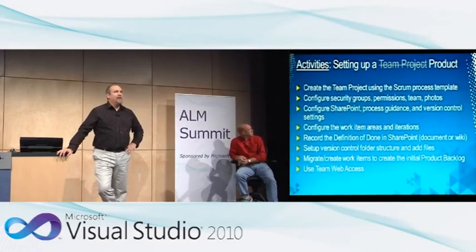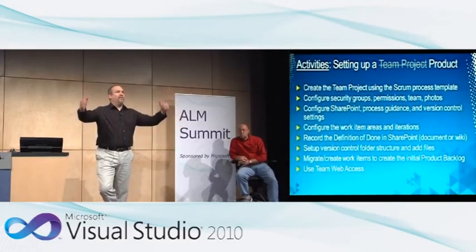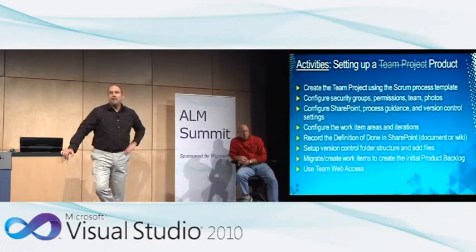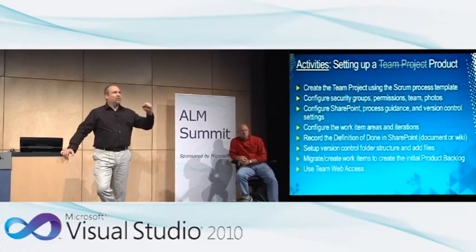We did an exercise in our Monday pre-conference where here's a big list of stuff. Some of it may be bugs. Some of it may not be relevant anymore. Some of it's things like we ought to back up our SQL Server every night. Awesome, I agree, but that doesn't go in the product backlog. That's more of an administration task that people should just know outside of that.